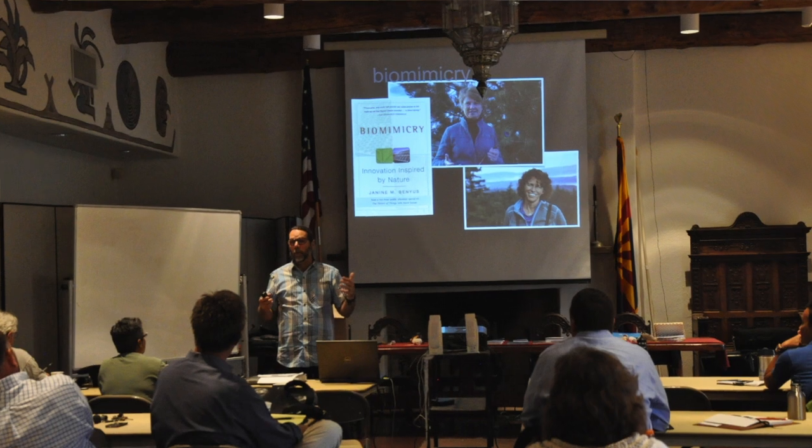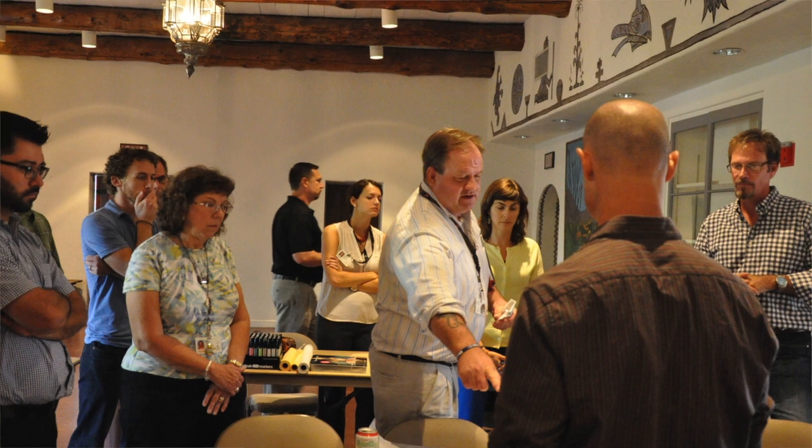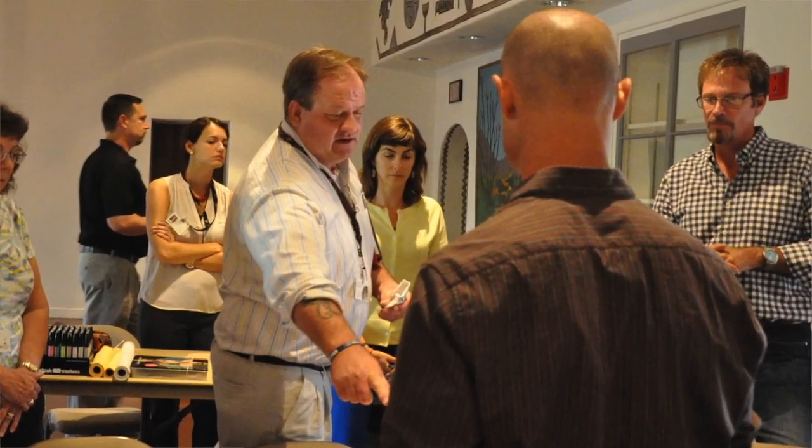We wanted to use the integrative design process, and that process is one that breaks the conventional paradigm of how projects are designed. The integrative design process brings all of those people together right away, along with all of the consultants, all of the stakeholders in the project, so that everybody is discussing things from the general to the specific. An architect and a contractor and the client actually all come together. Shareholders, trustees, staff, everyone that has input into making a project become a reality.